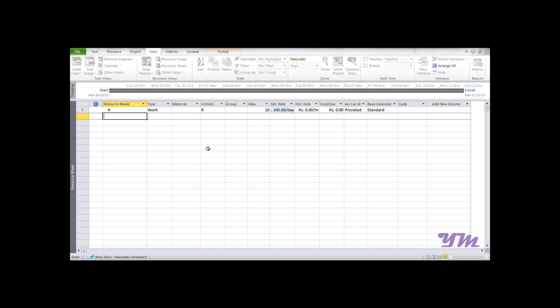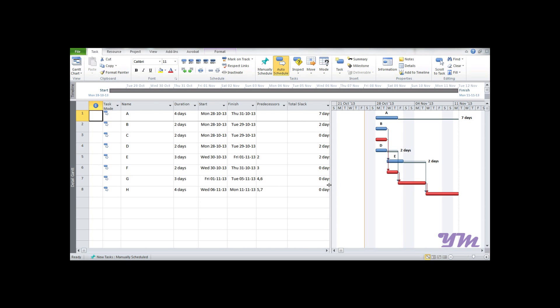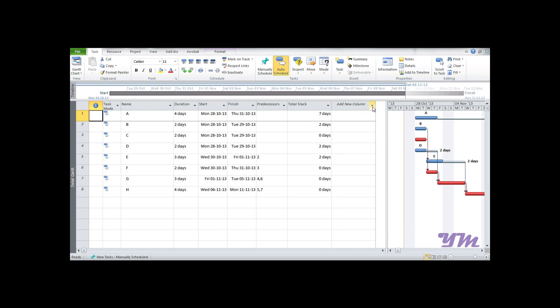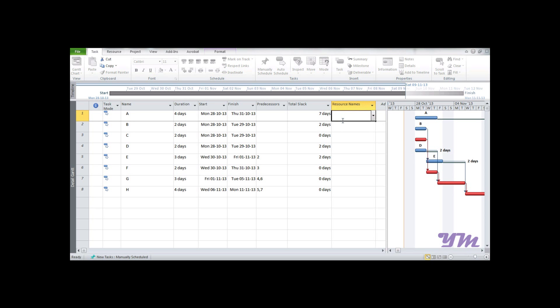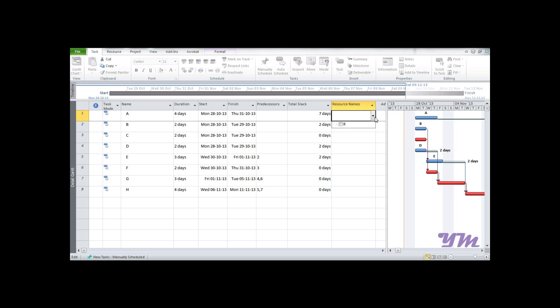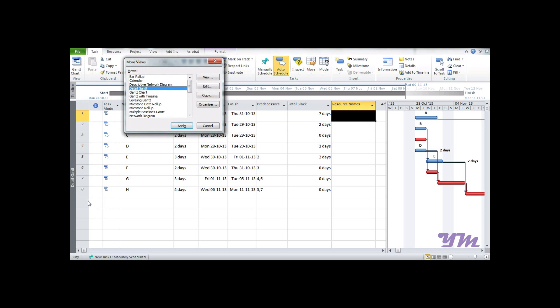Once done, we can go back to Task view. We can add a column named Resource Name. It's currently blank, so we need to assign resources to each task. To assign resources, you can directly add from here, but it's risky. I would suggest not to enter resources directly. Instead, go to More Views and select Task Detail Form.